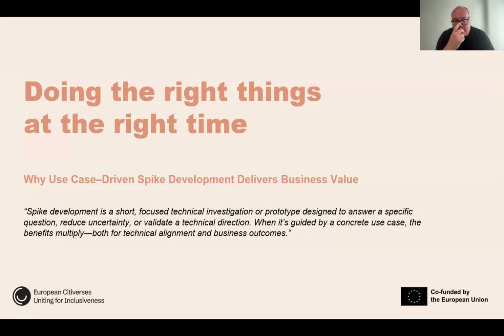Another angle that I would like to bring in is about doing the right things at the right time. I brought up this spike development principle, a use-case-driven spike development. What I essentially refer to is the work that we've done over the last 6 months. You could call that a spike. It's a short, focused technical investigation and prototype design to answer specific questions and validate the technical direction.